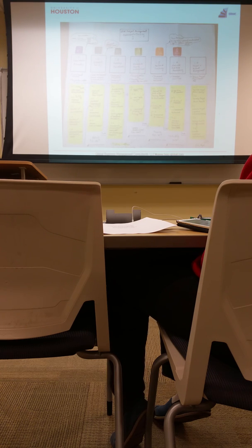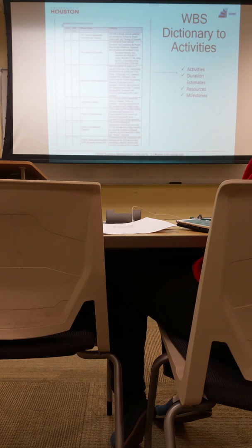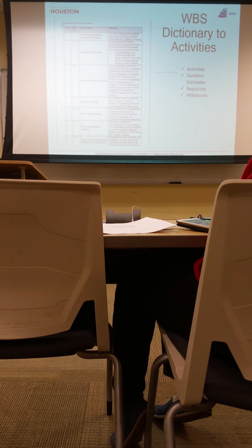So I took all of this stuff and the additional requirements and the information down here, and I put it into my WBS dictionary, right? So I have here item 1.1.1.1, which is a work package, understand the philosophy. And I detailed that out, and I put the estimates in here, and I put the hours that I think it's going to be in here. Okay?